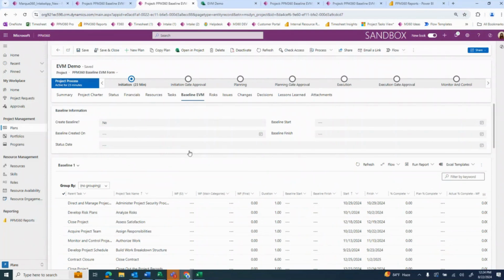Now, EVM stands for Earned Value Management. EVM is a project management methodology that combines cost, schedule, and technical accomplishments to measure project performance and progress. EVM allows PMs to compare a project's actual progress to its forecast, which can help them predict the project's outcome and identify potential issues early on. EVM can be used on a variety of projects, regardless of the size or type. Today, we are going to evaluate the schedule portion without factoring in cost.